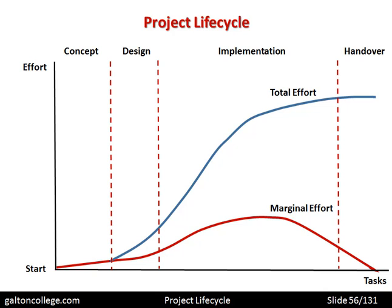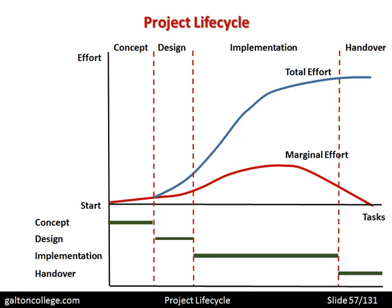We can also insert the four phases into this diagram: concept phase, design phase, implementation, and handover — similar to a Gantt chart. The green line represents concept, followed by the design or planning phase, then implementation, and finally handover. This gives us a way of looking at the project lifecycle and the effort required within each of the phases.